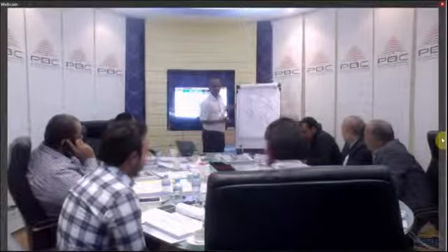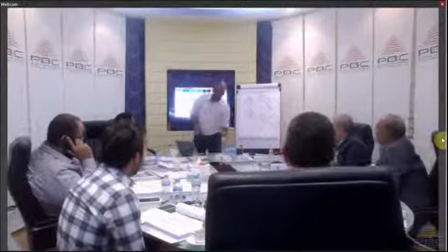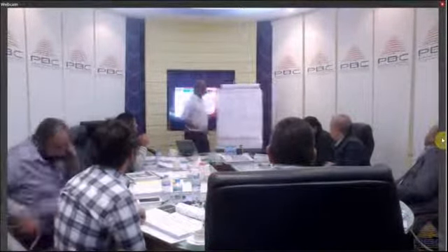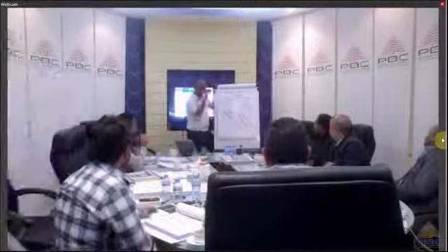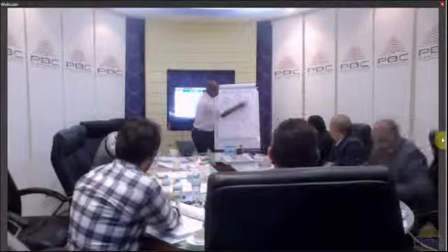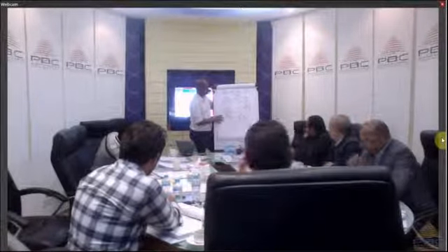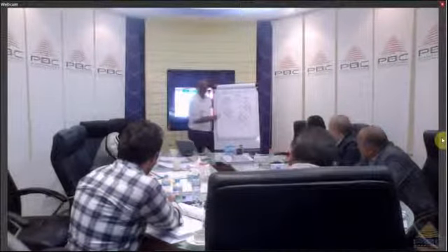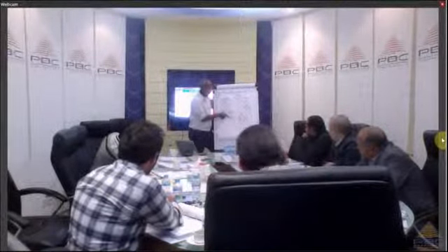Okay, so to answer the how long question, and to reach the stage where we develop the final schedule, this is what we do. Define the activities, sequence them to get the logical relationship, estimate the resources needed to do the activities, then estimate the duration.